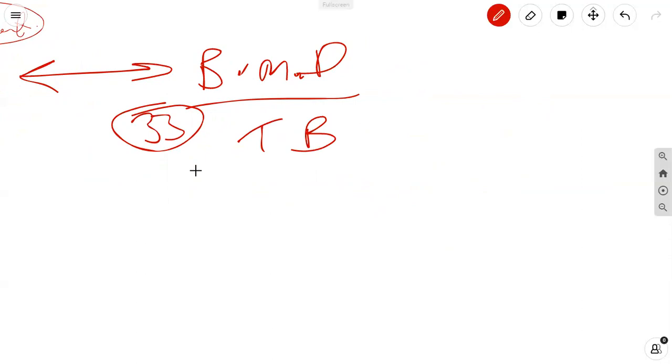Then you also have strategic alignment. How does this project align strategically to the business strategies of the firm? Then we have the time frame for realizing the benefits. How soon do you expect to realize these benefits? In a week, in a month, in a year? These things have to be talked about up front so that we ensure we maximize that project output.